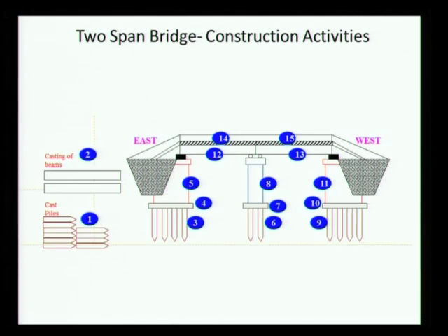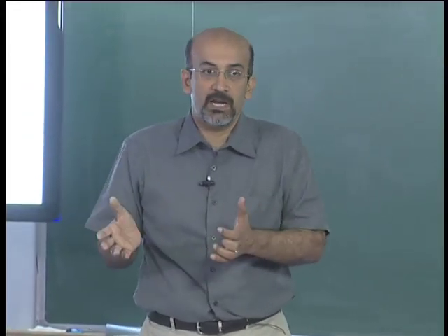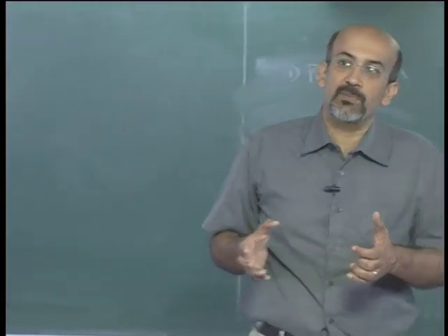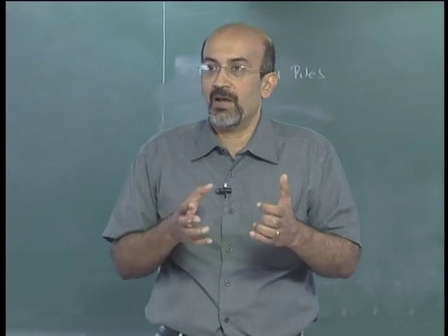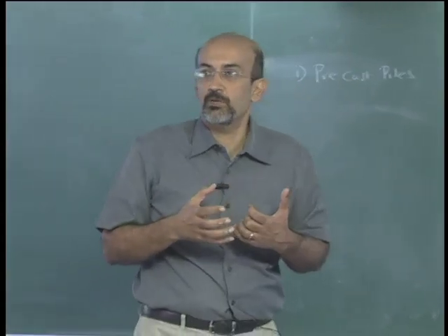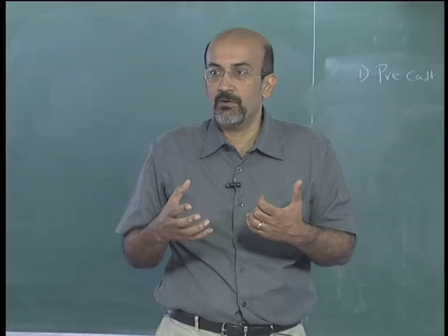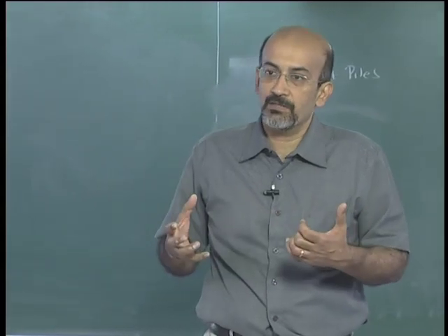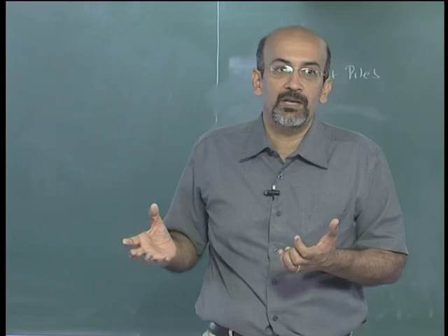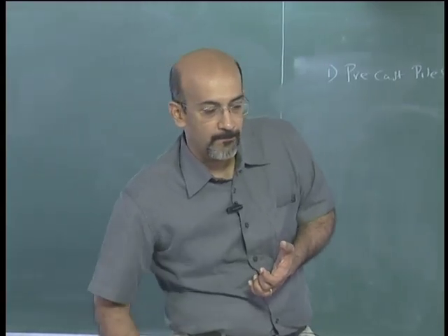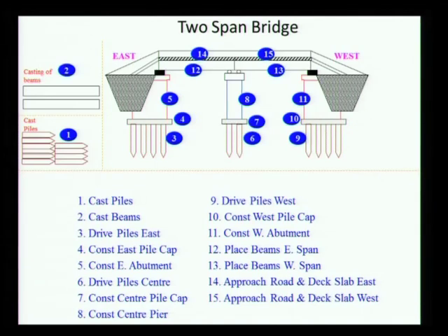Based on the sequence, of course in scheduling and whatever we do, the sequence plays an important part, but a lot of times we might not be able to see the sequence immediately. We just have to be able to identify the components and break down the project into a component breakdown, so that once we have all the components listed in the work breakdown structure and do all of it, the whole bridge should be done. If you go into this, you can see all of the activities which we talked about are here.